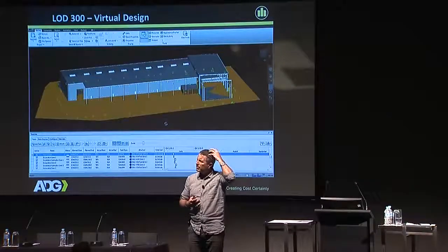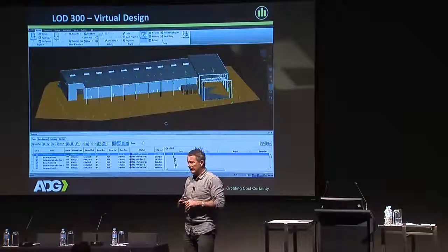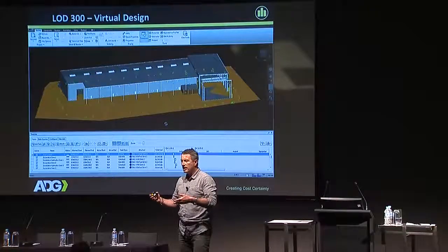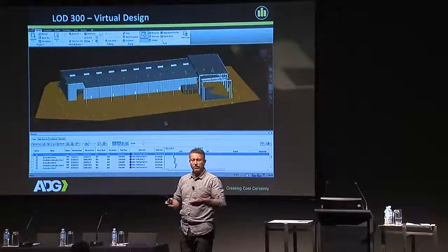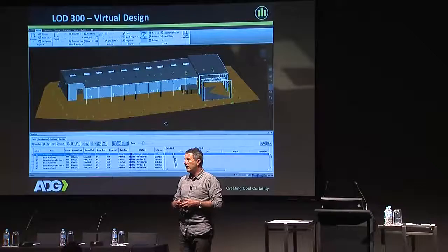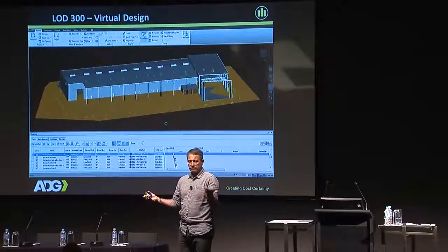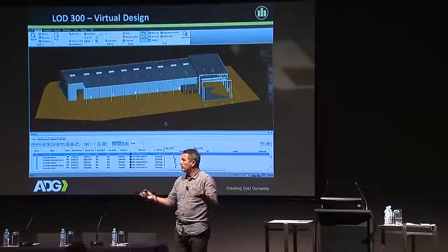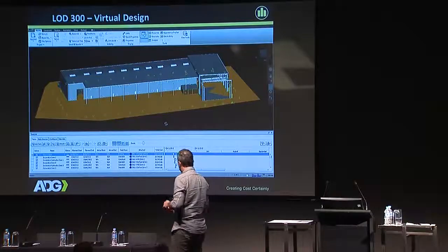The only software that'll do it quickly is Vico, actually. It marries these two things together fairly well. But the problem is that costs are often based on quantities, whereas our programs are based on man hours and that type of thing. And these rates don't match what we pay in hourly rates. So it depends on where you are in the supply chain and how you position it.